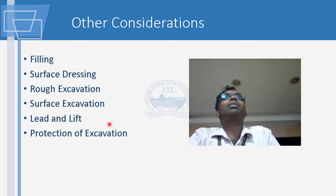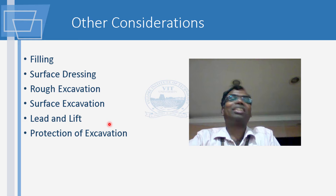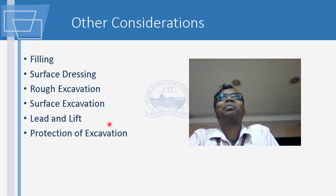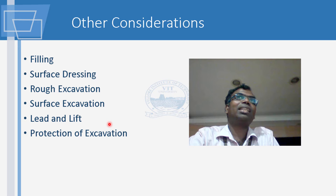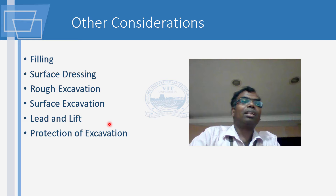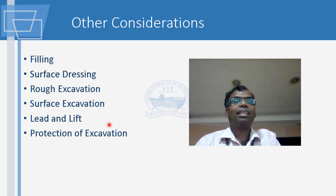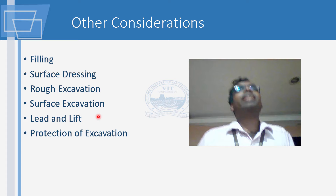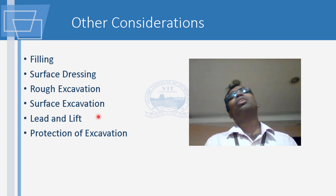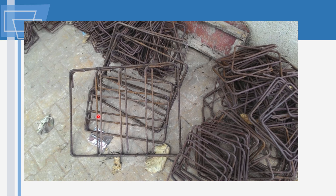Do you remember the unit of measure for surface dressing? It is measured in square meters. Surface dressing is a type of excavation where you do a maximum of 15 cm of excavation under very specific conditions. However, rough excavation is measured in cubic meters. Surface excavation on specific terms is measured in square meters, but almost all excavation is done in cubic meters. You need to understand and know what unit of measure you are working in. Please refer to the IS 1200 series, which gives the various units of measurement.